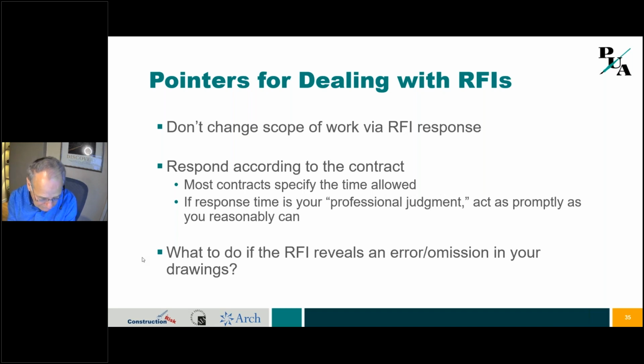You need to respond in writing to that RFI. Don't ignore it, but really give it a thoughtful response so that the contractor can fix the problem. And I had a case a few years ago where, had the designer taken my contractor's RFI seriously and given a logical response, we could have saved $1 million. Literally a $1 million claim came in because the RFI response was like 3 lines long. Instead of taking 2 paragraphs to explain what the designer wanted, it was 2 sentences long, we made a claim and we prevailed. So you've got to respond appropriately to the RFIs.